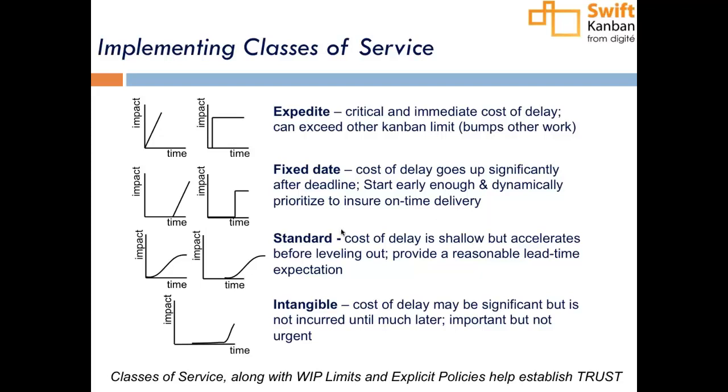You noticed when we talked about Little's law that if the input rate is higher than the output rate, then the system blows up or becomes infinite. There is a notion of utilization, and Little's law holds when the utilization is less than or equal to 1, that is, 100% utilization.